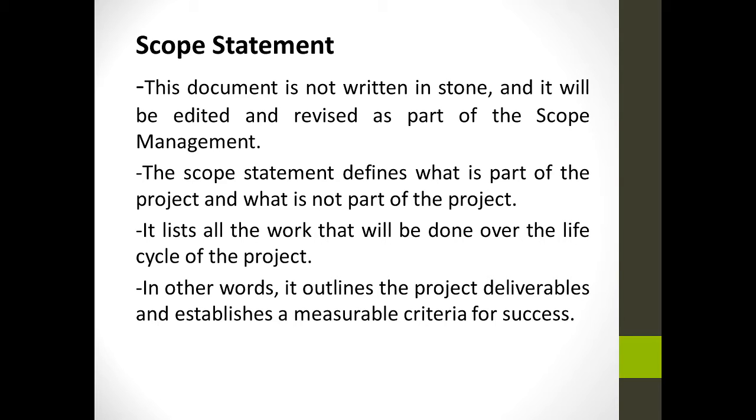Second is the scope statement. This document is not written in stone, and it will be edited and revised as a part of scope management. The scope statement defines what is a part of the project and what is not part of the project. It lists all the work that will be done over the life cycle of the project. In other words, it outlines the project deliverables and establishes measurable criteria for success.